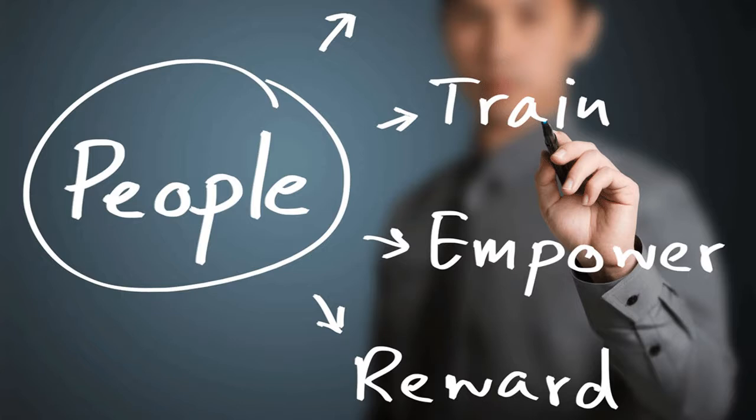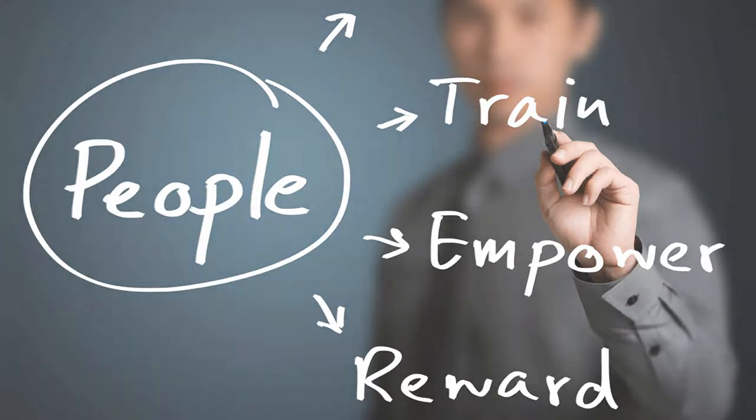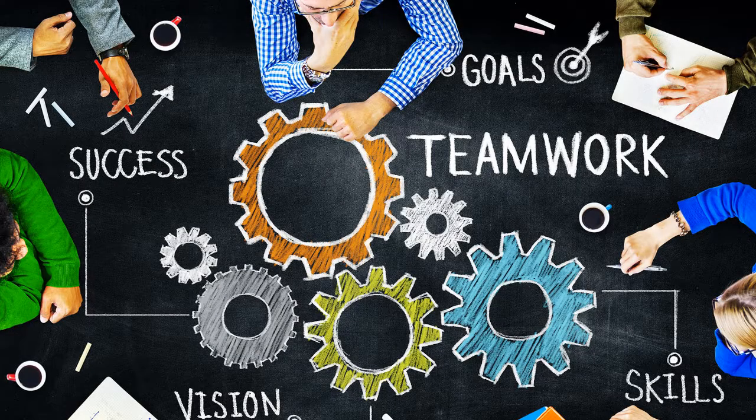In the image, we can also see employee distribution on certain days, when the workload is the lowest at the beginning and at the end of the project. To a large extent, the increase of employees in the third week is unwanted. This could be the key condition to revise the tasks and determine a new schedule.